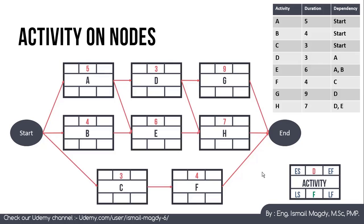For the forward pass: Activity A depends only on the start, so Early Start = 0, duration = 5 days, Early Finish = 5. Activity B has Early Start = 0, duration = 4, Early Finish = 4. Activity C has Early Start = 0, duration = 3, Early Finish = 3. Activity D depends on A, so Early Start = 5 (EF of A), duration = 3, Early Finish = 8.